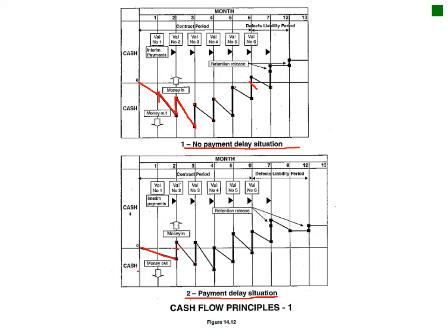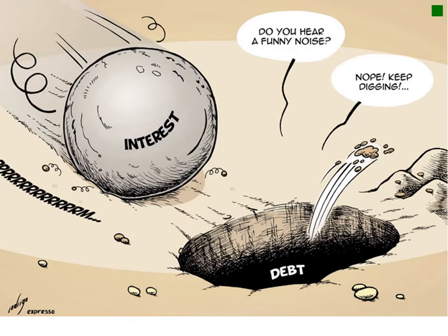So the amount of money that you have to borrow to finance this project is actually lessened, whereas you would have had to borrow that amount of money at one stage. Now you only have to have this amount as stated. Okay, and the main thing about getting this alleviated is to prevent as much interest as possible, because interest eats into your actual profit. Okay.